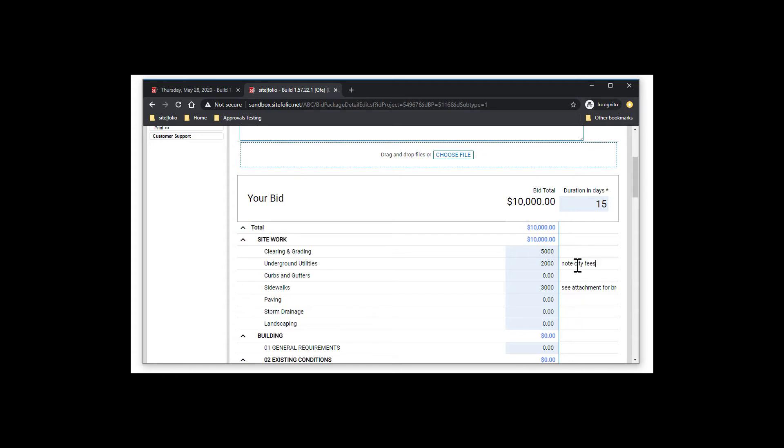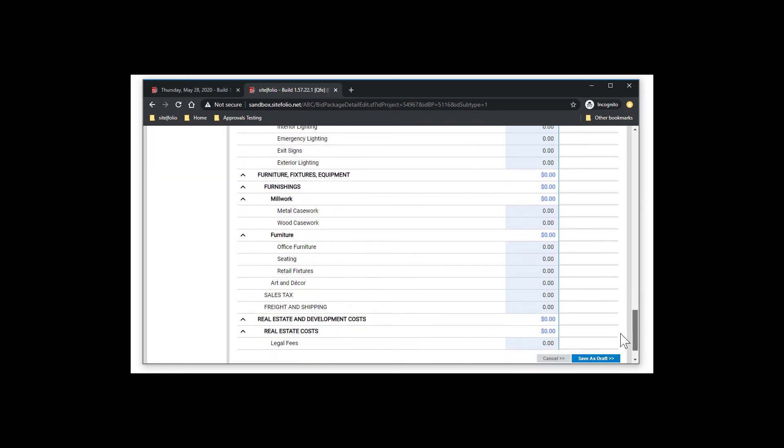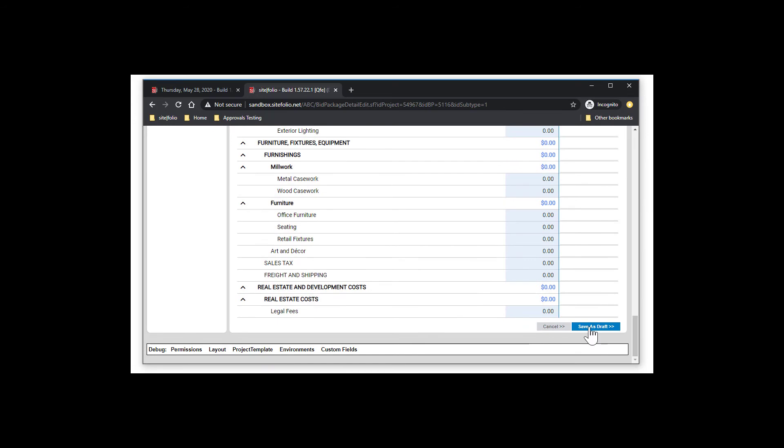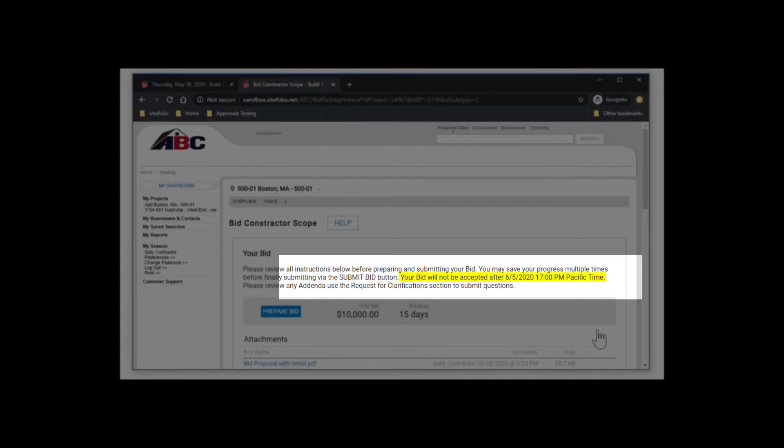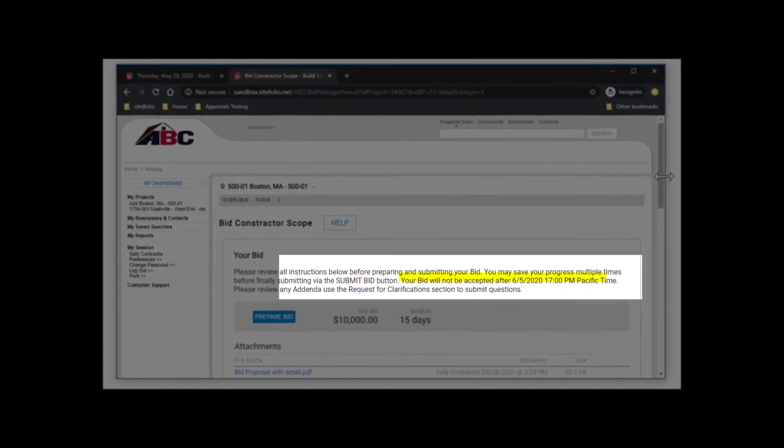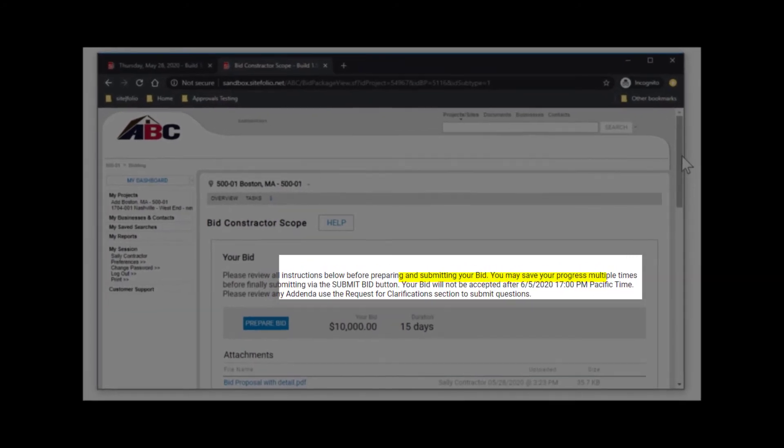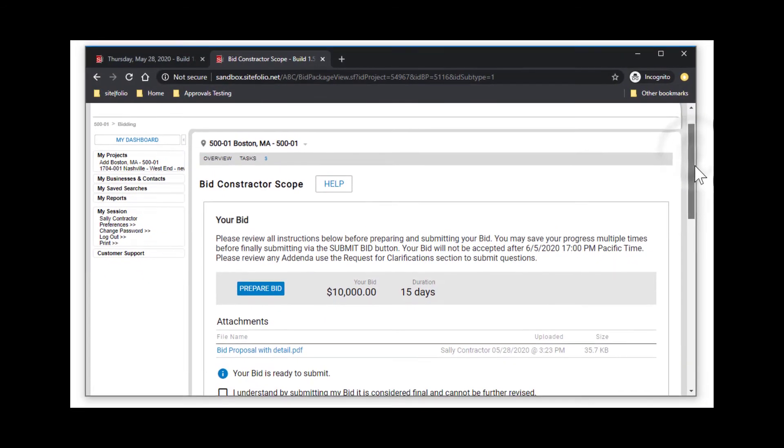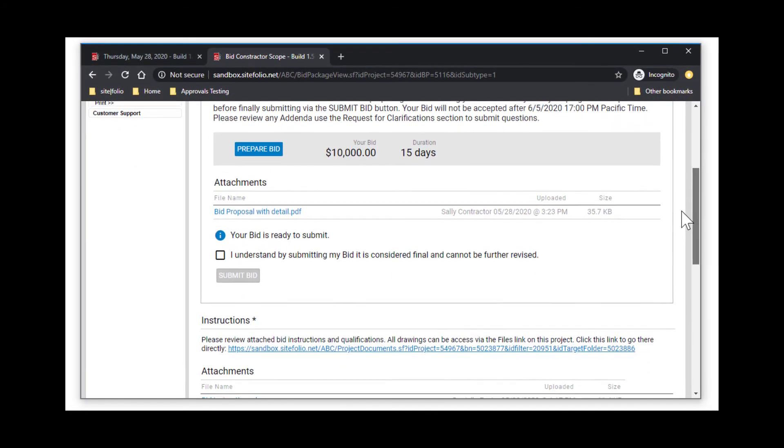Scroll down to the bottom and click Save Draft at any time to save your work and come back to it as needed. Always be mindful of the due date and time since no bids are accepted past the noted due date.